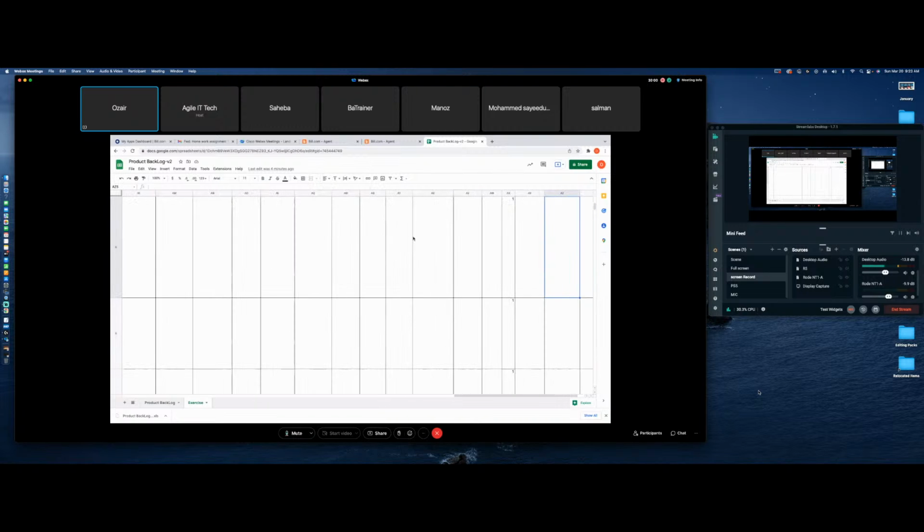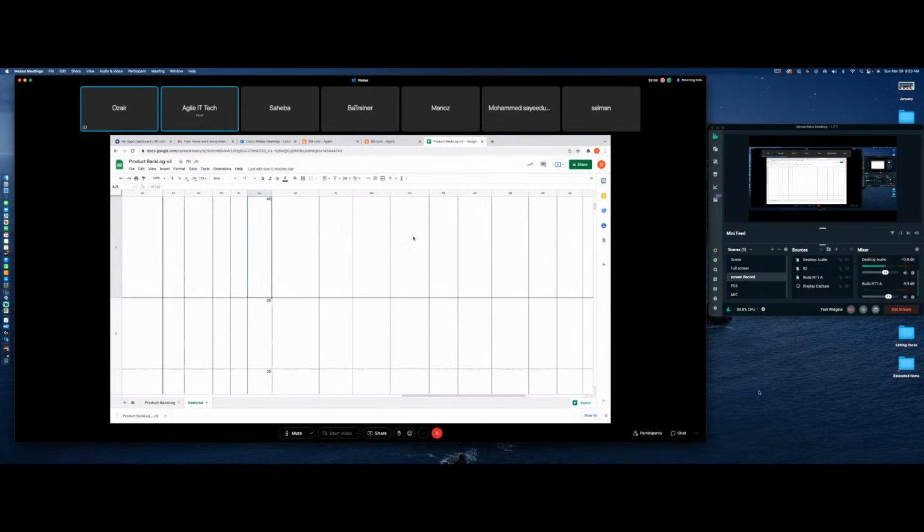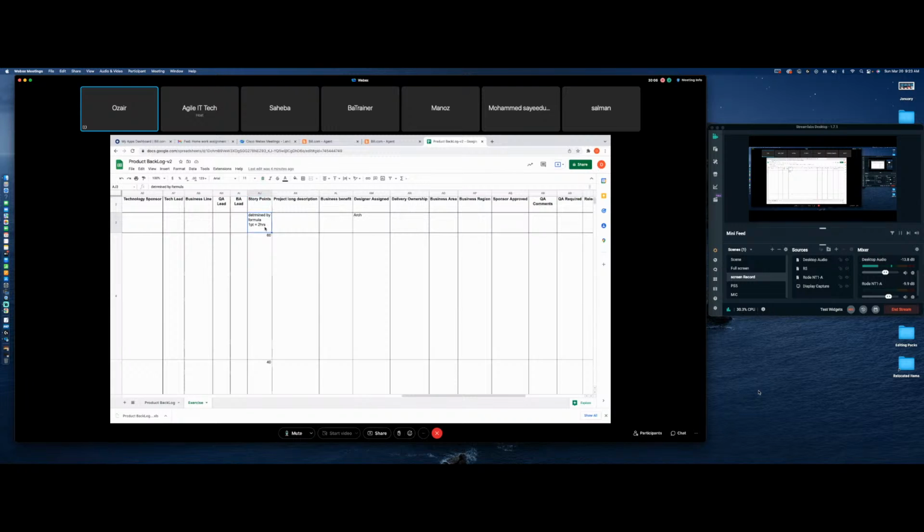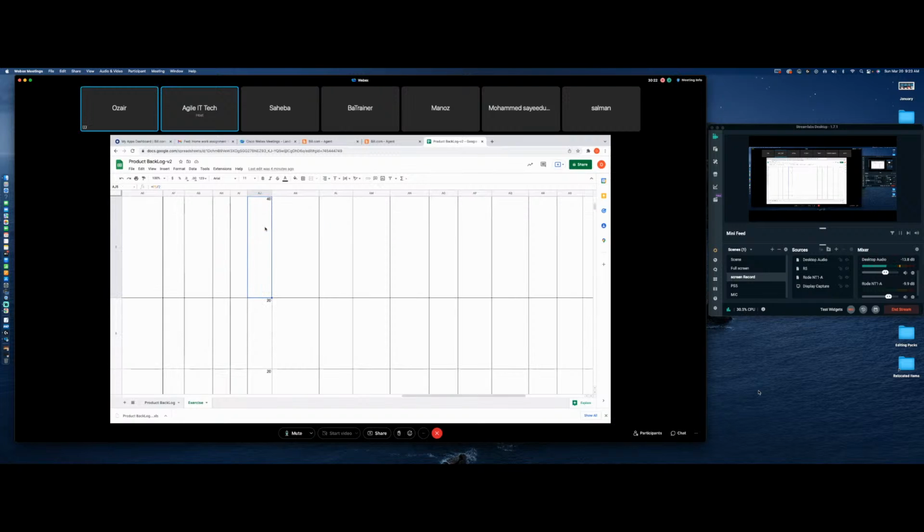40 points. What formula did you use? I've used the same formula. 1 point equals 2 hours. Okay, I increased that. That's really small. So you should do it like 1 point is equal to 4 hours or 8 hours. Typically, that's what it is. That was just done for easy math. Yeah, I just used the simple one. I was trying to make it as simple as I can, then make the changes.